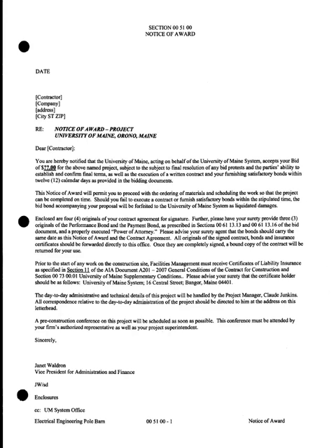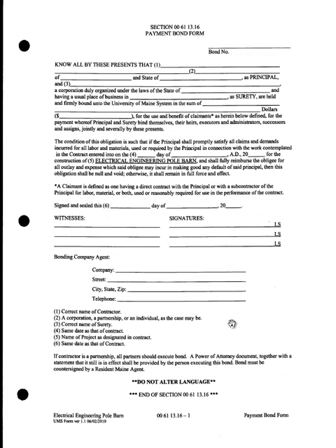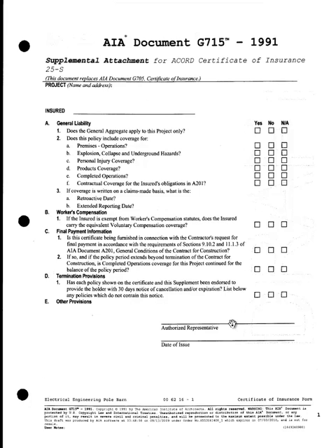The notice of award, this is just a sample of what the letter will look like going out to let them know that they have gotten the bid. Our construction contract agreement needs to be signed and sealed and all the other good stuff before they can actually start work. We can't actually start work until they have their bonds in place, so they need to be fully insured before they can even start here. Performance bond form, payment bond form, this is what they would send in when they need their payments done. Here's our AIA contract document. We use AIA documents for all of our material.